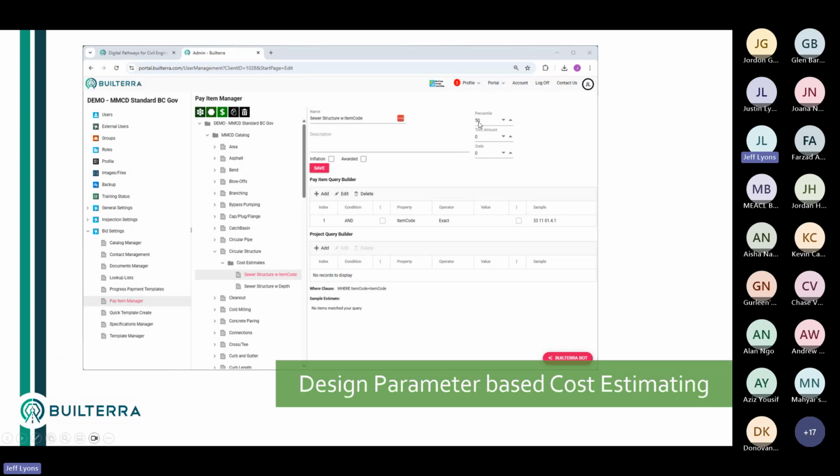50 percentile, right down the middle. Maybe you're doing a letter of credit and you want to use a 20%, or maybe you want to be conservative with your client and say it's 80%. So there's various things you can do to move that pricing.